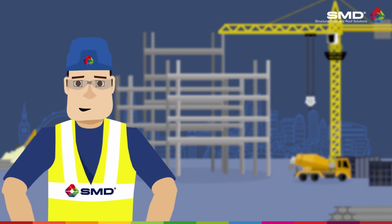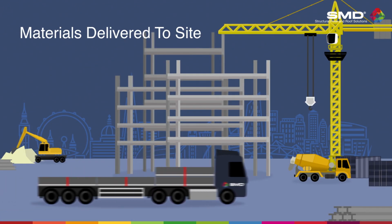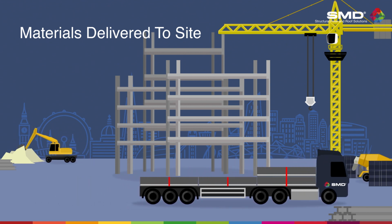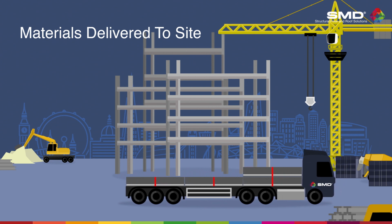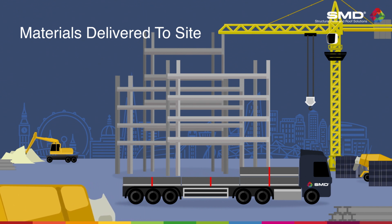Prior to SMD's installation team arriving on site, key activities will need consideration, planning, and action. SMD materials are typically delivered to site on articulated lorries with a flatbed trailer. Depending on site logistics, lorry size options can be changed to suit access to delivery areas.